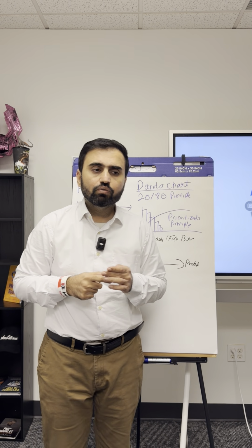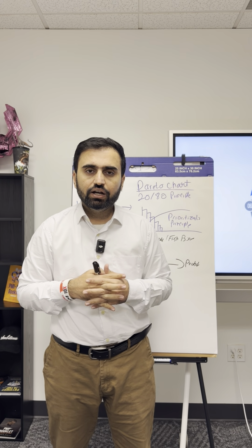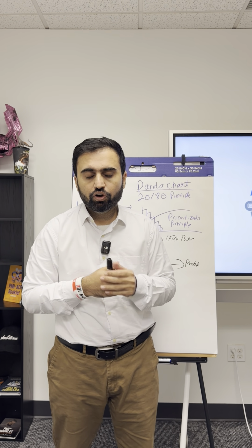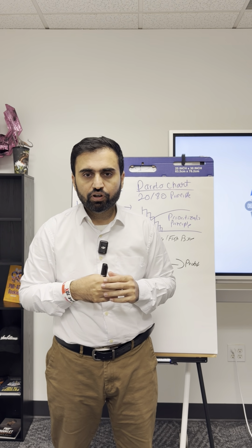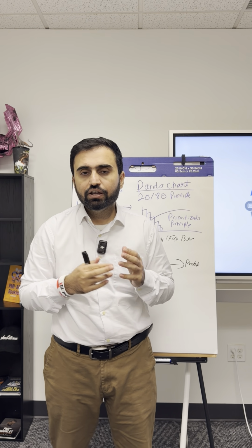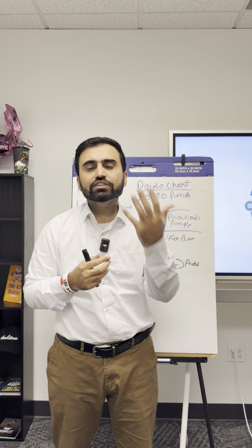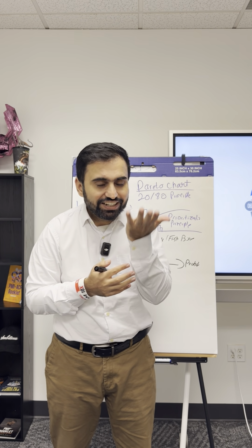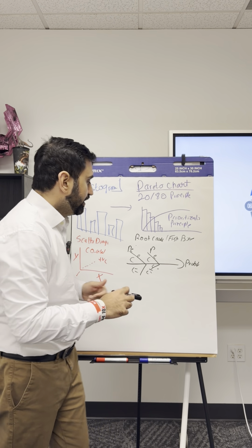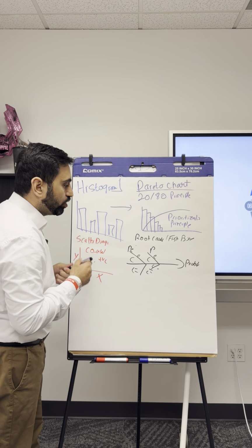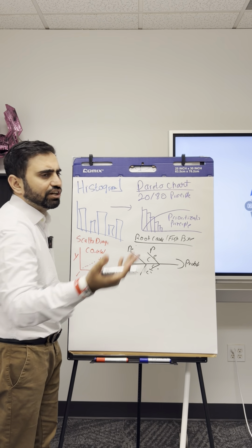So for example, why was this defect made? The right process was not followed. Why was the right process not followed? It was not properly conveyed. Why was it not properly conveyed? It was not documented. Why was it not, like, why, until you find the bottom of it. Okay, this is the fishbone diagram, root cause, why analysis, Ishikawa diagram.